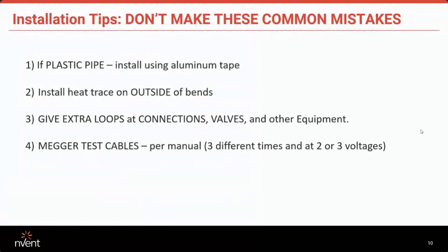These are very important. If you ever have to come back on a different contractor who's maybe come back and maybe they installed the insulation with a screw, a fastener, and accidentally screwed into a cable, you now have those results written down, and you have something to go back on and say, no, this tested fine. Here's where the problem happened.